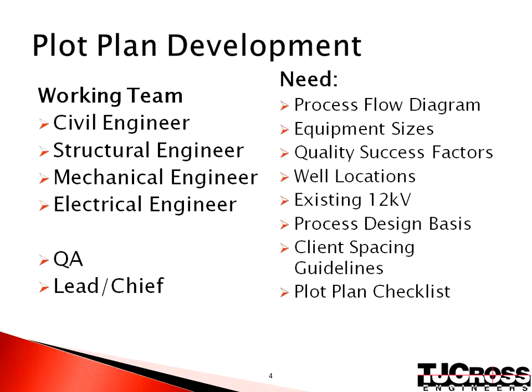During plot plan development, the project manager will facilitate input from the civil, structural, mechanical, and electrical engineers. We will need the following: the process flow diagram, equipment sizes, quality success factors, well locations, existing 12 kV, the process design basis, client spacing guidelines, and the plot plan checklist.